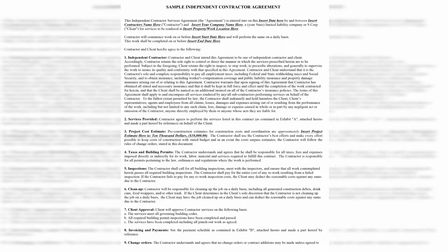So say you don't have a general contractor. We do this with Jersey, right? I don't have a general contractor. I mostly have subs. So I get my own HVAC guy, plumber, electrician. I have them sign this independent contractor agreement, but they're also signing that they are liable for any subs. So if anything happens on the job, they're supposed to have that insurance to protect them, and it also protects me. I also have my insurance, of course, on the property as well, but I want to make sure that they're signing off that they have theirs as well. So those are just a few things that I put in my independent contractor agreement.